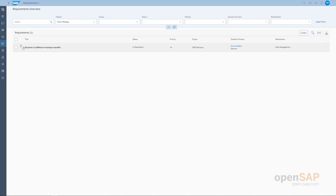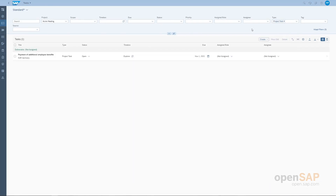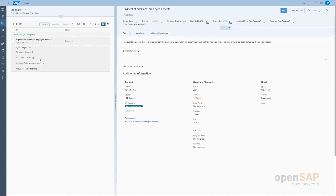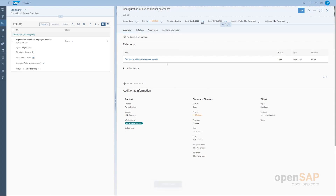Navigating back to the task list and filtering by project task type, we can see our requirement has been broken down into an actionable task. Opening the task, we can see it has consumed all information from the requirement, stores project information, and provides a quick link back to the requirement. We can also create subtasks from tasks, breaking the task down into smaller, more consumable items of work. We'll call this subtask 'configuration of our additional claims.' You can create as many subtasks as you wish, and the relation back to the requirement is stored in the subtask.